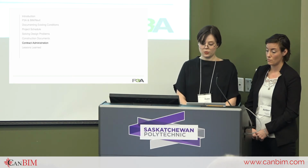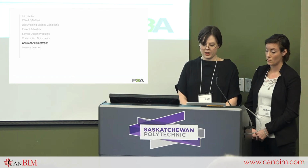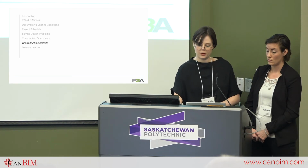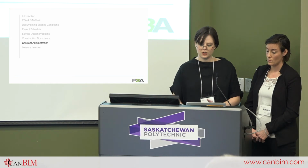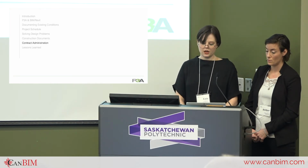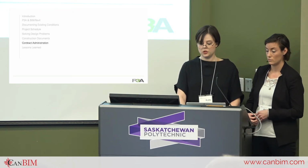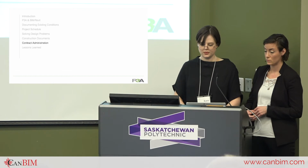The contractor was beginning work before all of the drawing packages had been designed. The contractor is not aware of what we may be planning, and so we have to assist on identifying issues that may be impacted by upcoming packages. Finally, the complexity of the project, the detailing that was required was extensive, and nothing could be identified as typical, as there were variations required in every room of the project due to the as-built condition.